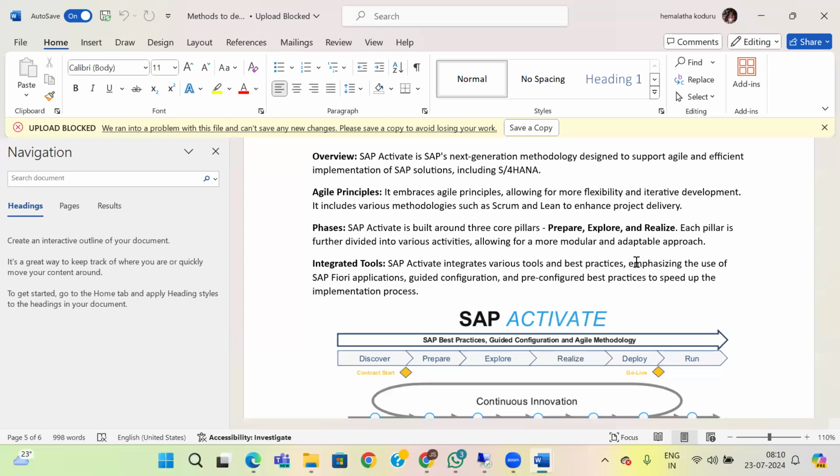Once they have got the transaction code access, they'll post. And however they are posting, they'll check whether this functionality is working the same as before or not. Once this is done, they'll give you the go or no-go option through email confirmation. Once that is done, you will deploy all these things in the production system.